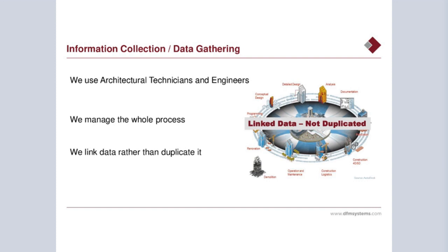A safety file is only as good as the information that's in the file. So care needs to be taken in terms of collecting that information to ensure that it's relevant, that we don't end up with hundreds and hundreds of pages of catalogue cuts, when really what we're looking for is 2 pages out of that catalogue to reference or detail the information on the particular equipment, rather than the catalogue of equipment that might or might not have been purchased for the project.